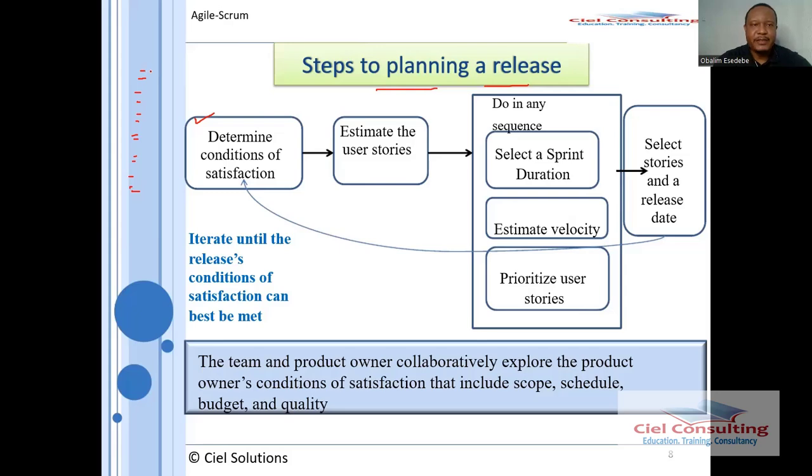So usually, every user story that you have within the product backlog has to have what we refer to as story point. So story point is like a weighting system. We're going to talk about that much more later. It's like a weighting system, which of course we use in order to distinguish the user stories based on certain factors. For example, complexity, risk involved, or ease of implementation. And then, of course, it can also be based on expected benefits.